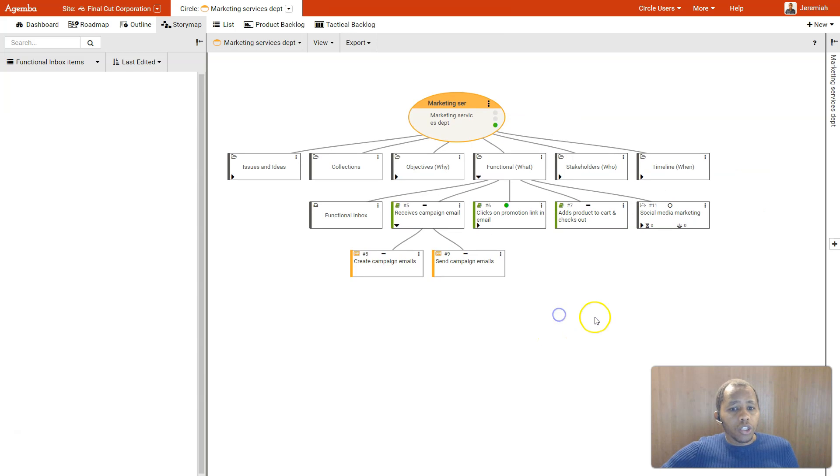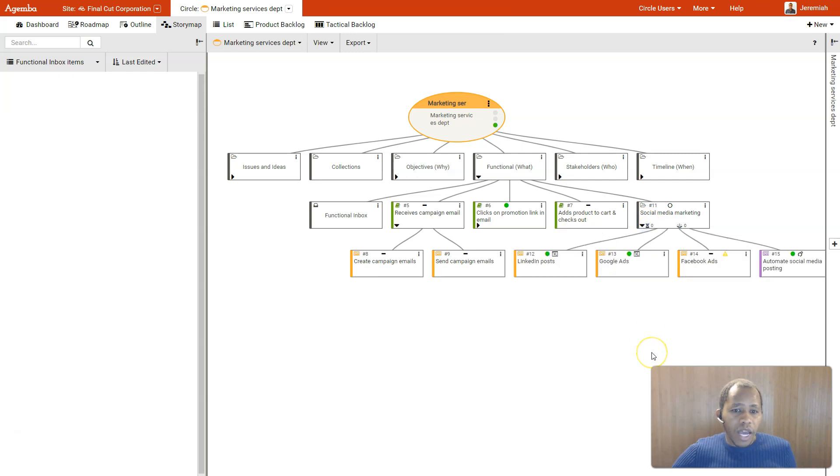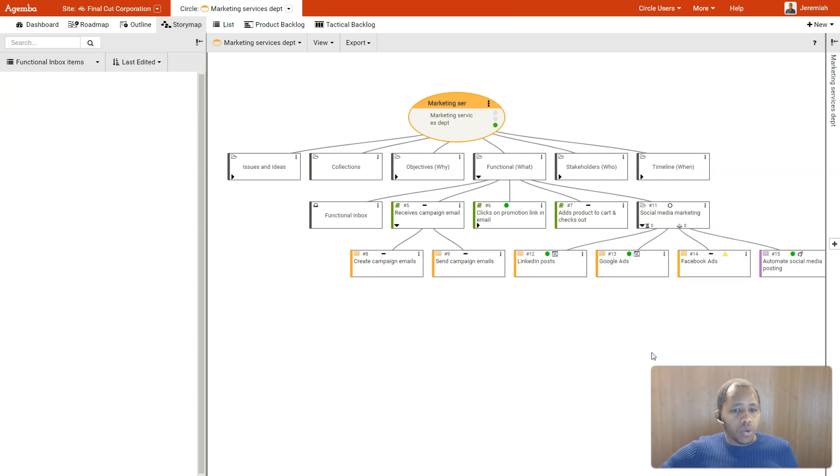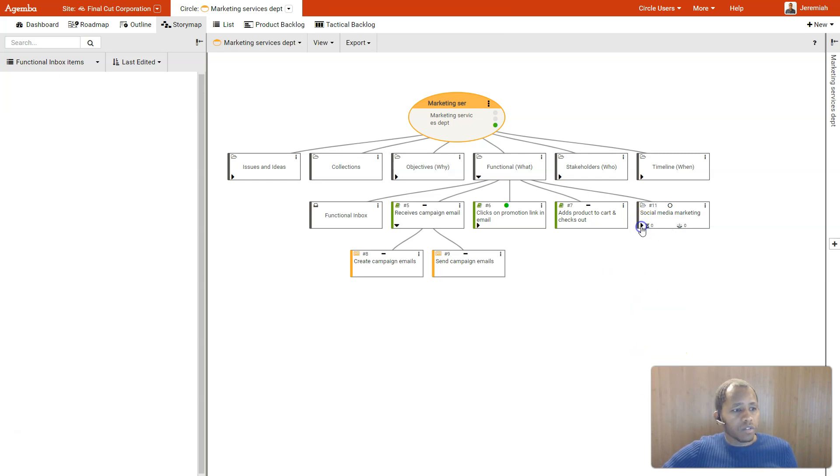You can also build it up more thematically, grouping the work that needs to be done in folders and breaking down large epics into smaller stories. You can view each branch of the map as a tree structure, linearly, or as a deck of cards to flip through.